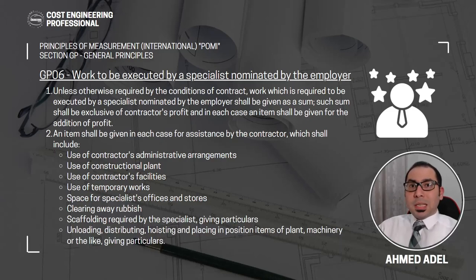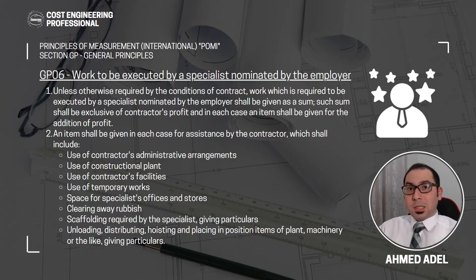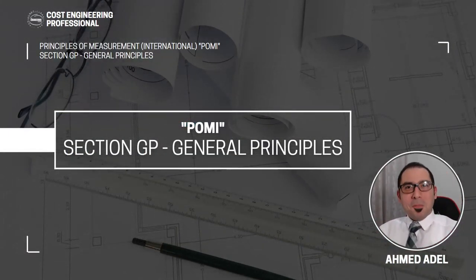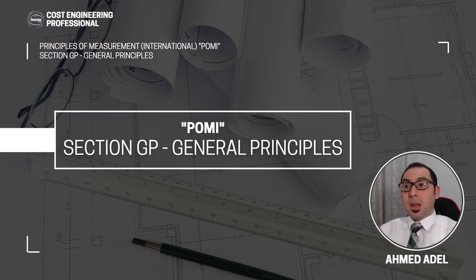You have seen provisional sums in all the BOQs — they keep the provisional sum in one line item and add another item for contractor attendance, overheads, and profit. Hello guys and welcome. I am Ahmed Adel and this is Cost Engineering Professional. In this video we'll be talking about the general principles of POMI part 2.